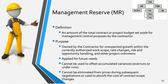MR is used to budget future internal needs, but it may not be used to pad the future to offset previously accumulated overruns or underruns. When the prime contractor is negotiating with the government customer, MR is typically not separately identified, and once it is identified, it cannot be eliminated from pricing during subsequent negotiations or used to absorb the cost of project level scope changes.